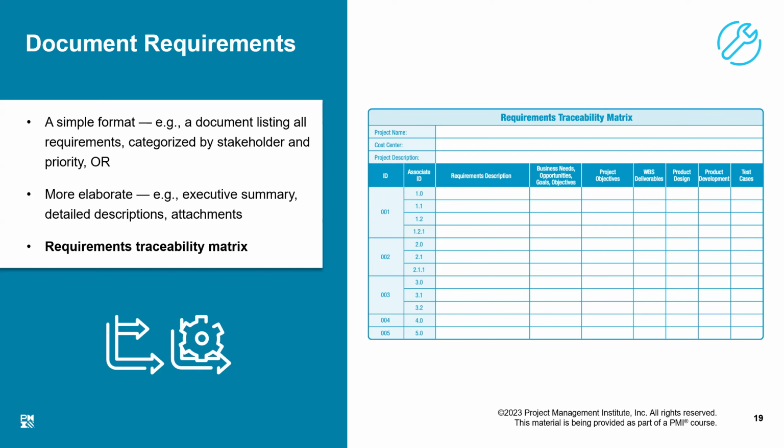Now, you would say there are a lot many details about the requirement. It is not just a simple list of all the requirements, but it is a mechanism of tracing or tracking a requirement throughout the life of the project, right? Naturally, there might be more columns which could be added. So, who was the stakeholder who originated this request? Later on in the life of the project, as I said, stakeholders keep coming and going.